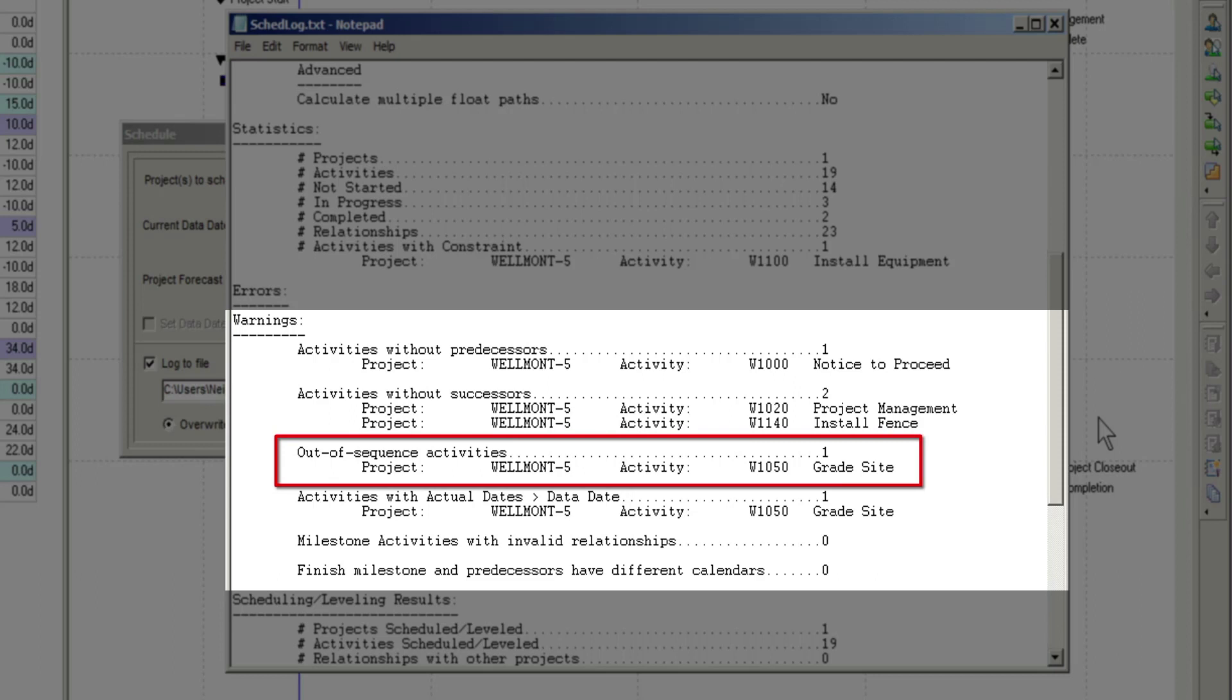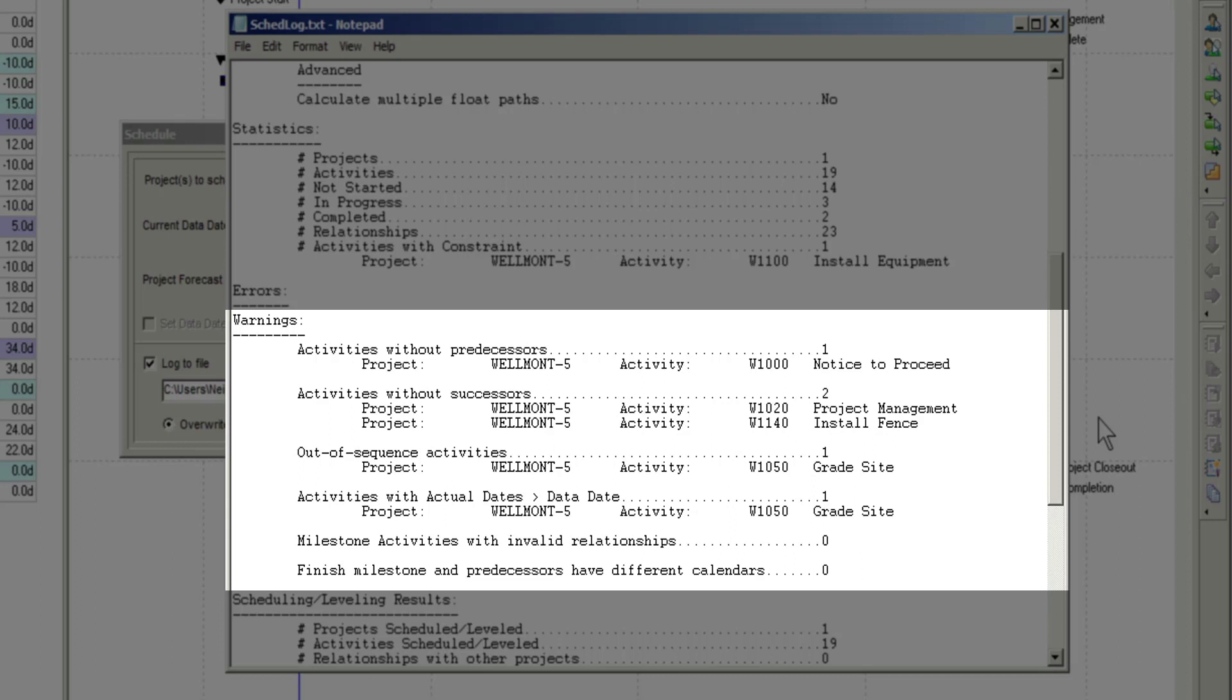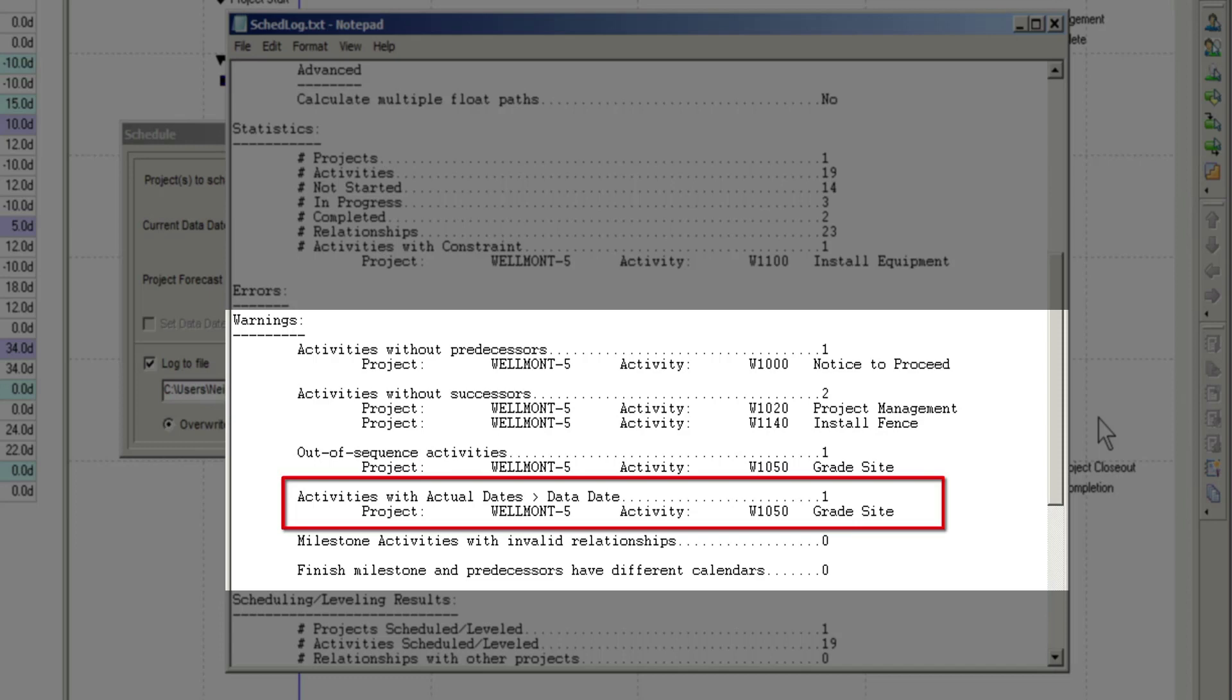This will happen if the activity started before its predecessor was completed. That is considered an out of sequence event in P6. You will also see the same activity listed under the Activities with actual dates greater than data date heading.